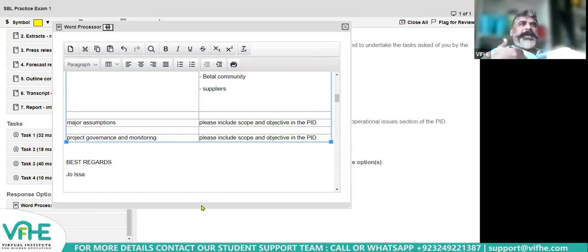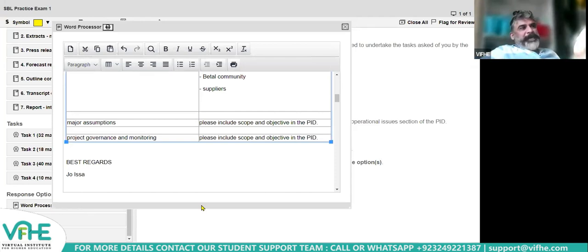So what should be, in your view, the frequency of this progress report? Normally, it is monthly, it can be quarterly, depending on the duration and the speed of the project. This is an almost three years, 8 months project. You want monthly or quarterly? A quarterly progress report is also fine. Monthly is also fine. It depends on how tightly you want to control.